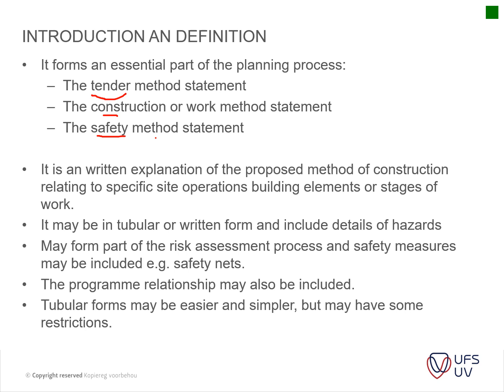It's a written explanation of the proposed method of construction relating to specific site operations, building elements or stages of work. It may be in a tabular or written form and include details of hazards. I personally like the tabular forms, but it's totally up to you. It's a preference thing of writing it out or putting it into a table in a point manner.